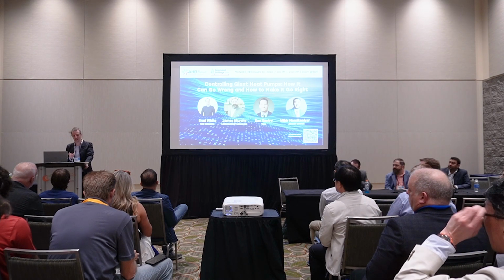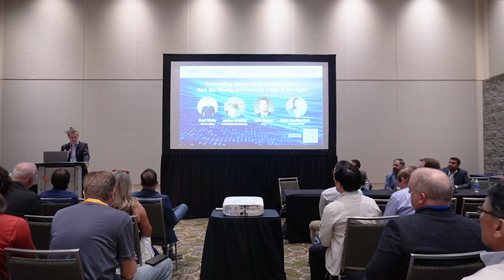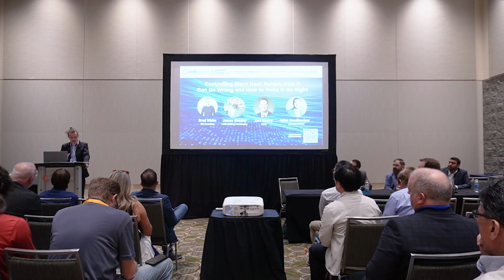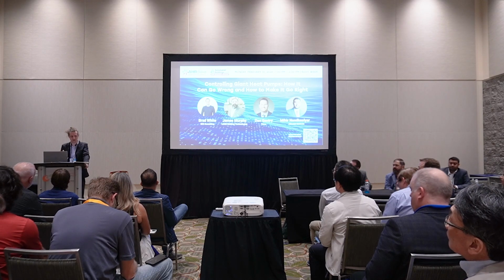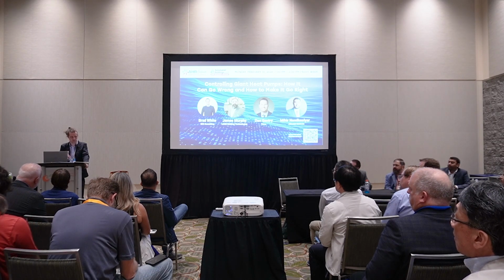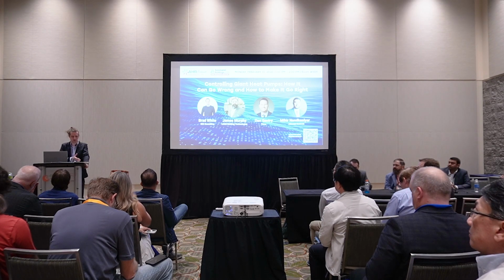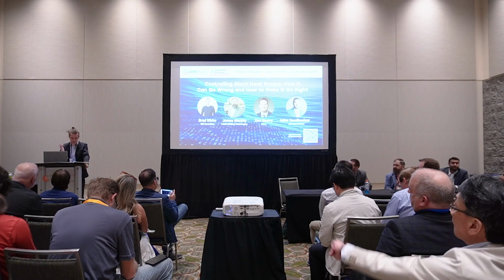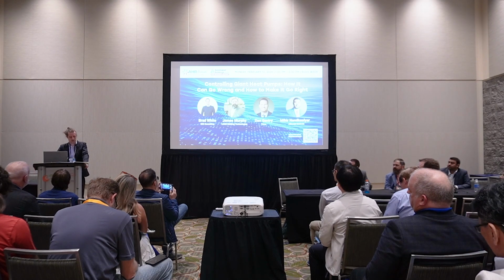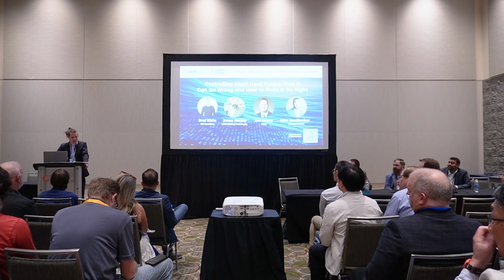So now we're a long way from the project that was supposedly fully commissioned to a heat pump that is not working at all. And then the question is, well, is this still being commissioned? And well, no, commissioning's done. Now it's the control contractor trying to troubleshoot this with an operator who's operating 20 schools. Well, where's the consultant? He's like, well, no, the project's done. They're gone. All right. So now we're getting pulled in to help sort this out.